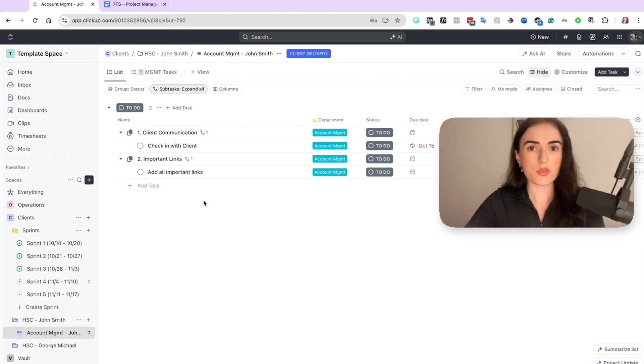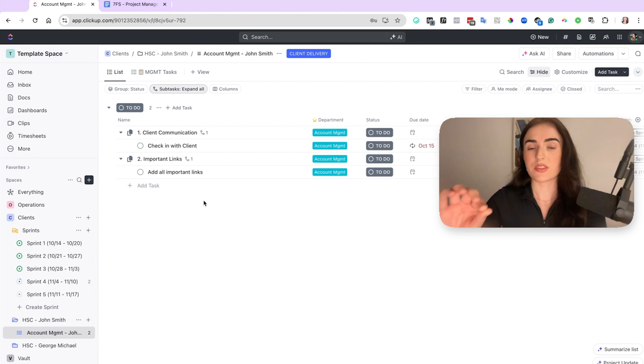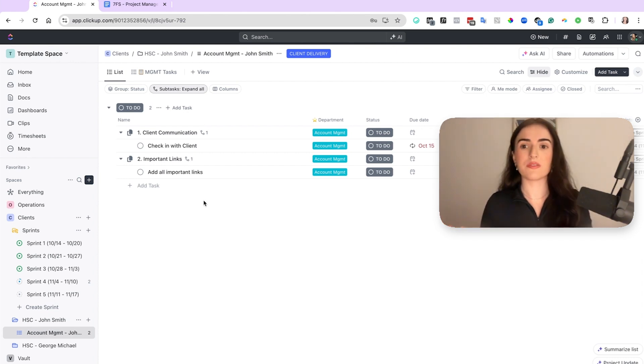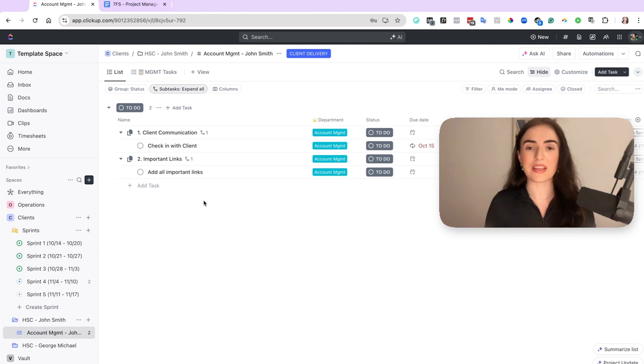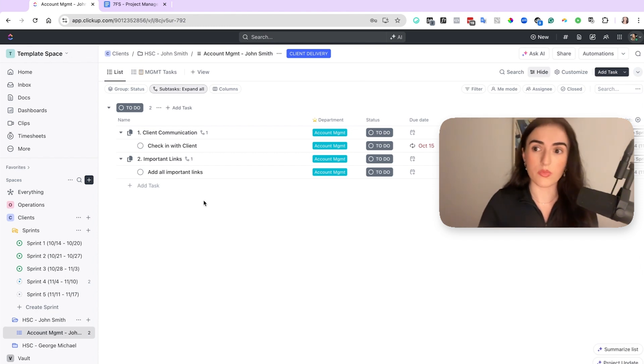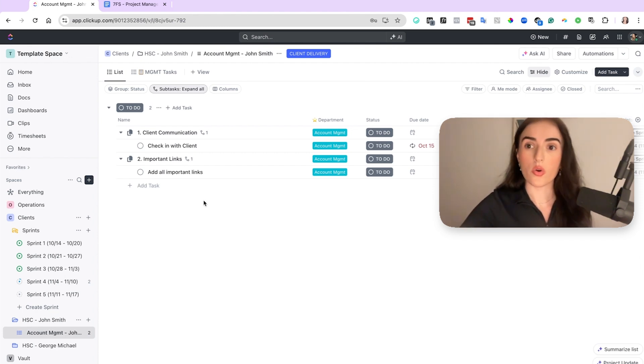So when it comes to planning for your team, you always need to have 70 or 80% of their tasks on the sprint and then just leave the other 20 or 30% for urgent tasks, last minute tasks, or last minute requests from yourself, your project manager, or your client.